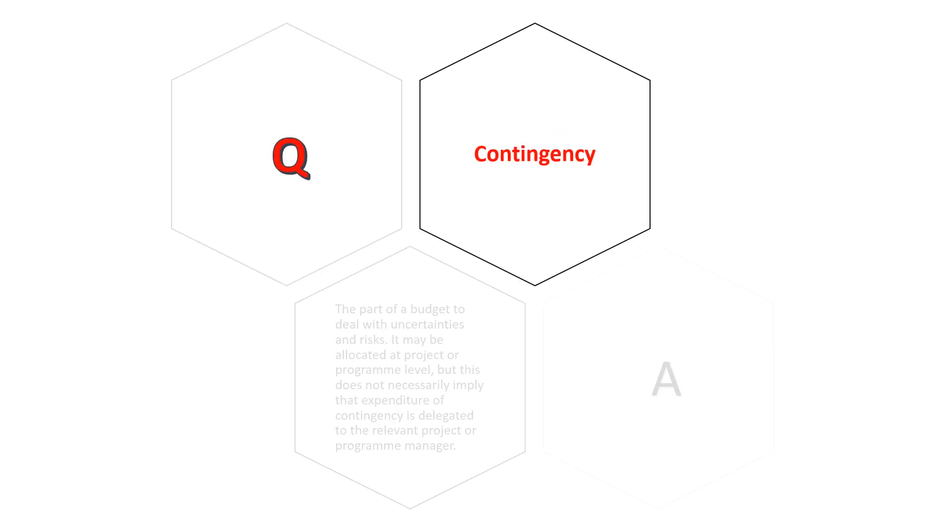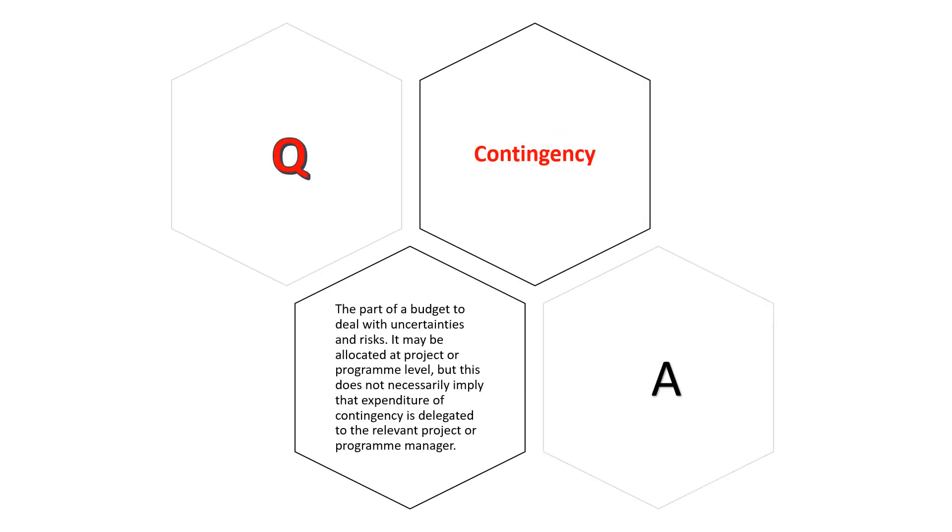Contingency: The part of a budget to deal with uncertainties and risks. It may be allocated at project or program level, but this does not necessarily imply that expenditure of contingency is delegated to the relevant project or program manager.